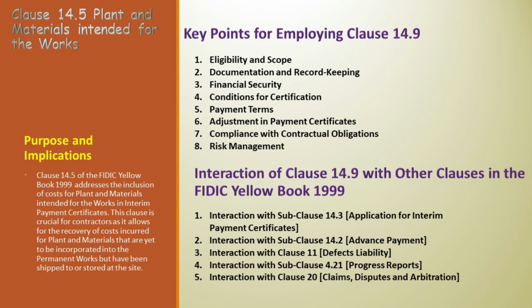Financial security. Financial security is a key aspect. Bank guarantee: provide a bank guarantee in a form and amount approved by the employer, valid until the plant and materials are correctly stored on site and protected against loss, damage, or deterioration.